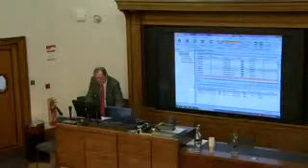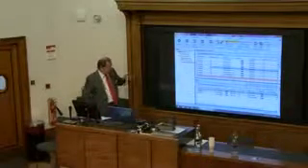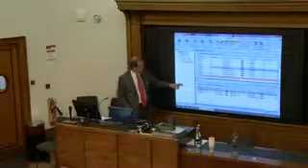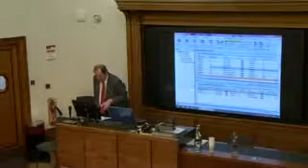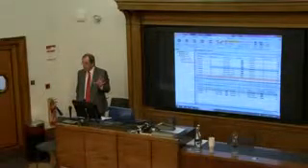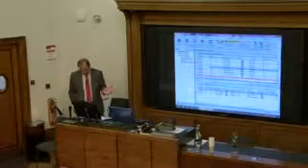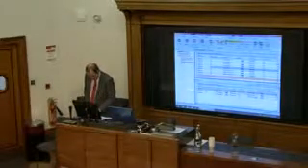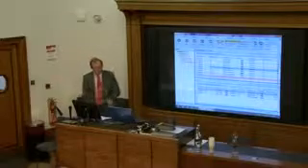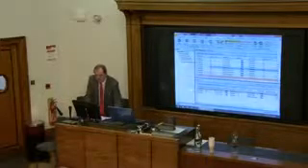For example, if I look at activity 41 to 48, it's saying logic link 41 to 48 I don't need, because I've got 41 to 42, 42 to 43 and 43 to 48. Therefore I could delete that logic link and it wouldn't mess up the plan. You don't have to delete the logic links, but it makes life a little easier. So I found some logic links that are redundant.